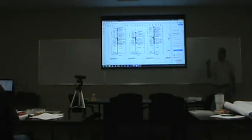Somebody do, you got your calculator, John? Give me 100 divided by 1.33. Give me 75 by 20. 1,500. Okay, you got 1,700 feet of studs, roughly. Please don't write this in anything other than pencil. Feet of stud and track to run. And we know that parapet is about how high up from the deck up to the top? 4 foot 8. Five foot times 100 is 500 square feet of sheathing, right?